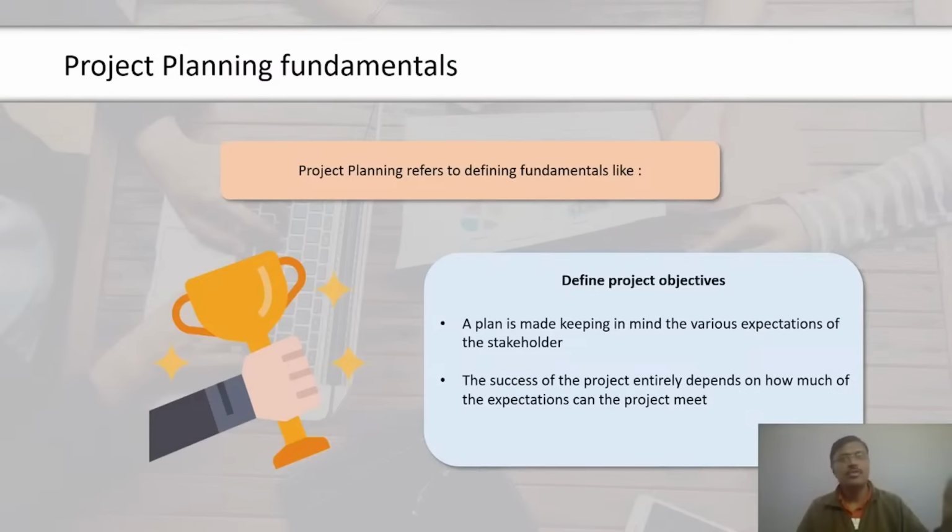The dates are starting from 11th of December, but the dates we have provided are from 1st of January. Now we will copy the cell, then go on the dates box. Here, we'll go to format axis. In the format axis, we can see minimum. In this minimum, we will paste this value and press enter. As we press enter, we can see a Gantt chart starting from the date that we wanted to start and that in the correct order starting from task 1 to task 3. Now as a result, we have our final Gantt chart on the screen.